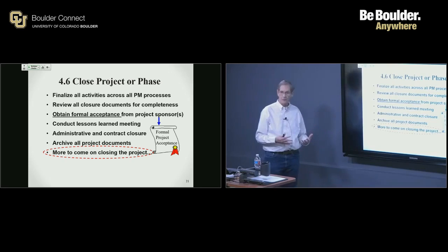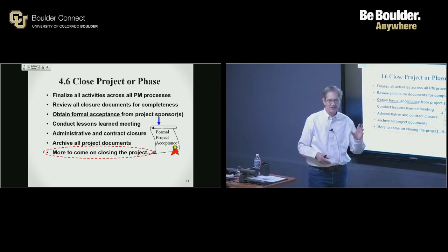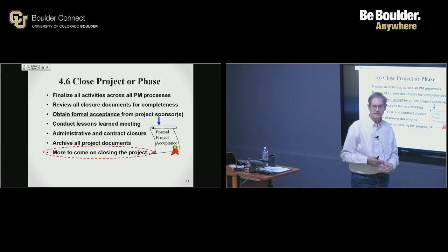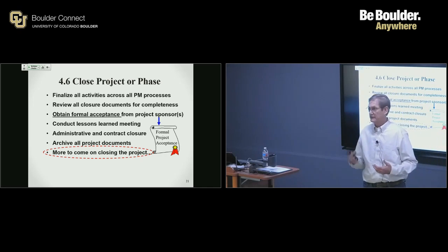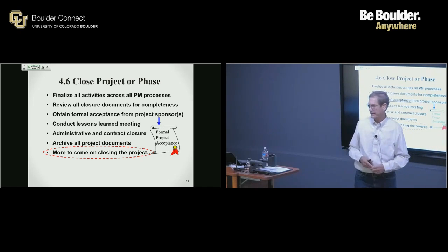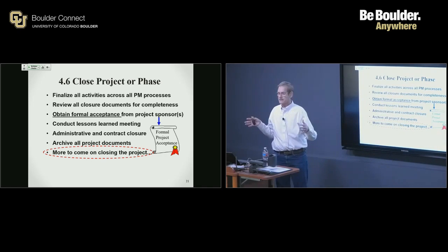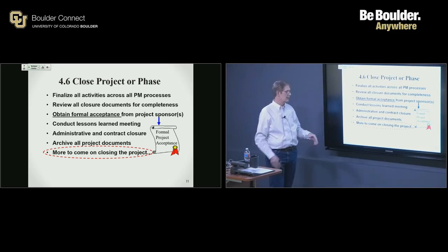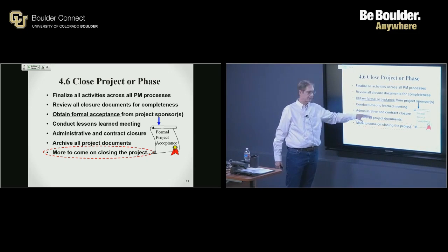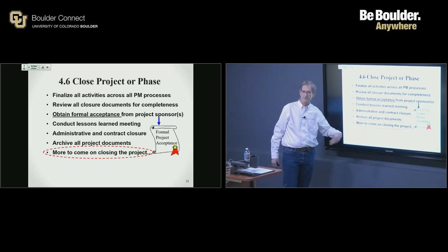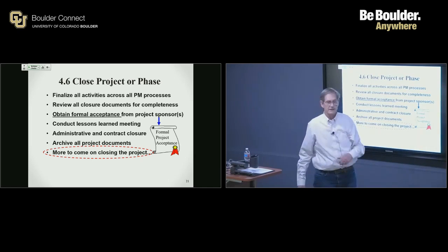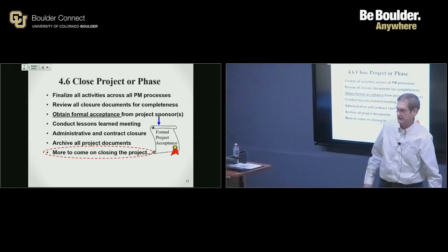Then, at some point, hopefully everything's gone well and it's time to close out the project or phase. Oftentimes we end up just closing out a phase, like the design phase, the construction, the implementation, the test phase, the training. So very often we break projects into phases, which is a great thing to do. So closing out the project or phase, this is where you're looking for formal acceptance, you're looking for sign-off on whether or not the project is complete, making sure that you archive the documents and that you maintain the records. And again, we'll talk a lot more about closing the project toward the end of the semester. Okay? A lot of things to think about.